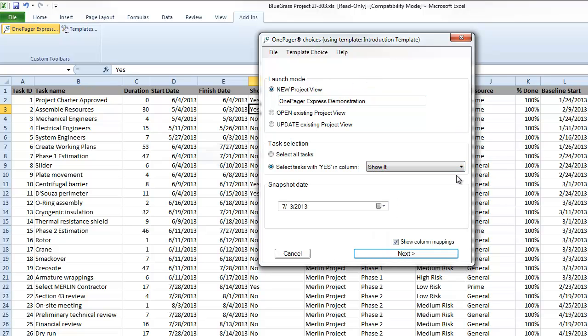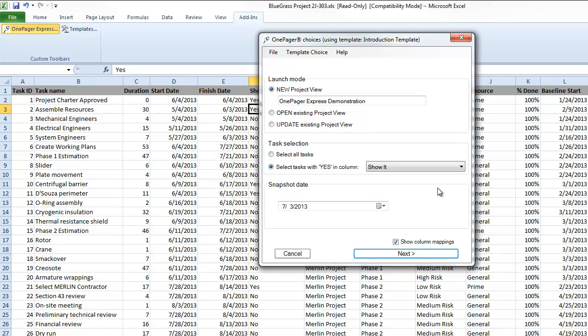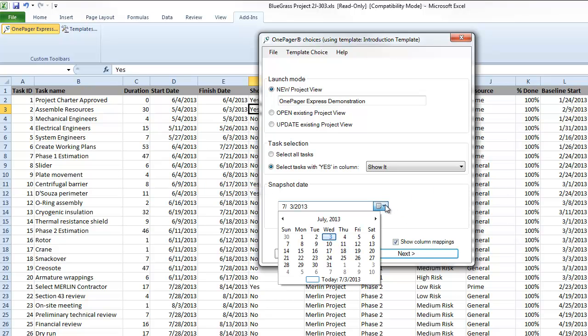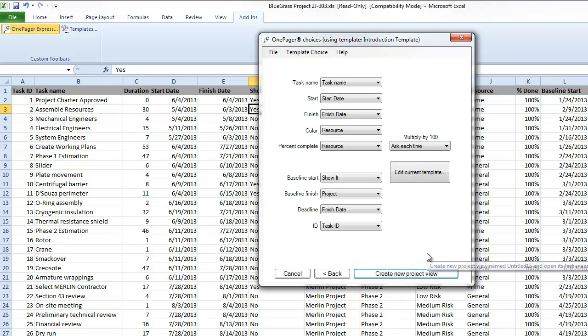Notice that you can also select all the tasks in your plan, however in my case I have lots of tasks, so unless I'm trying to create a wall chart with OnePager, which is something the tool supports, I won't want to select all. The bottom section of the form allows me to set my snapshot date, which is meant to represent the date and time to which the data driving my visual is accurate. When I click Next,